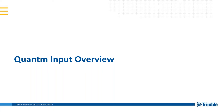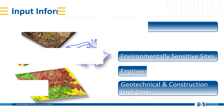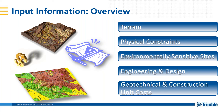The system has a very strong cost estimating benefit as part of the technology. For core inputs, you don't need to have everything — just the key drivers influencing alignment placement. For a haul road it's not a huge amount: your digital terrain model, your physical constraints and GIS data, environmentally sensitive sites as spatial data — avoidance areas or areas to minimize impacts on or apply additional cost to — and the engineering and design criteria such as design speed, minimum horizontal radius, and maximum grades.